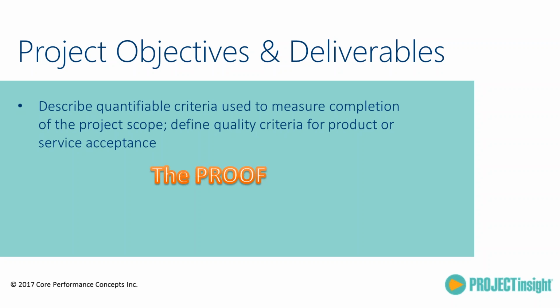Having those conversations early on is so key, because you really have to get that nailed down up front. And projects that don't have a charter, haven't had these conversations, are very difficult to close out. Because when we close out the project, we want to get their sign off. So a lot of times we don't ever close a project. I know that never happens to you, but they're hesitant to sign off.